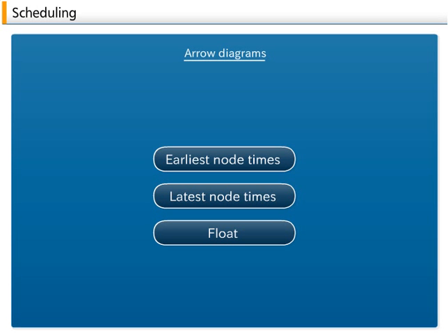Although in arrow diagrams there is no limit to the number of activities that can have the same starting or ending nodes, there is a rule that the next activity cannot be started unless all of the preceding activities are completed. In addition, there are no limitations to the extent that activities branch out in midstream. However, there can only be one starting node and one ending node to the overall project.